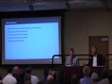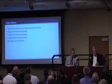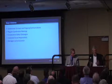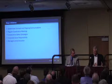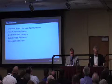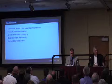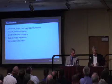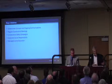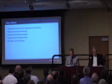Regular coordination meetings, Scott can speak to this a whole lot better, but we had coordination meetings not only with us, the communicators, and what we needed to communicate, but in order to have the information to communicate, we had to sit with the traffic guys. We had to sit with the schedulers. We had to sit with the construction segment managers and figure out what it was they were going to be doing, because we promised everyone out there, from the motorist to the resident, that we were going to continually give you a 6 week look ahead, depending on where we were in the project at that time.